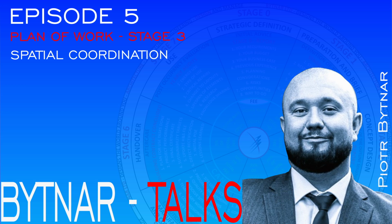You see, some people may think CDM is only for certain projects of size and complexity, when in fact it is applicable to all construction projects, and we need to think about safety and delivery of projects, whether they're small or large. The difference is with bureaucracy of the process. If the building is a little bit bigger, then we need to notify the Health and Safety Executive and perhaps do things in a more involved fashion. Also, decision making regarding construction methods and scheduling and risk mitigation strategies is initiated to guide subsequent project phases at that stage.